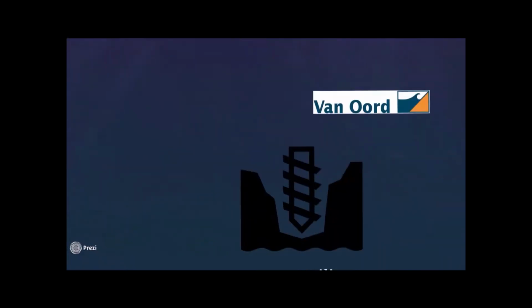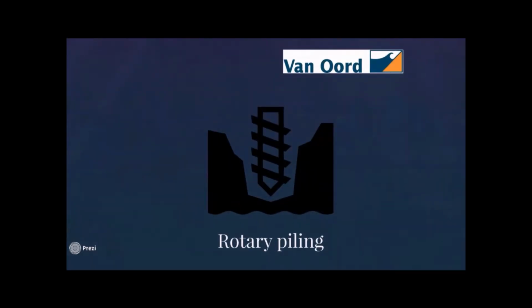Furthermore, the monopiles for these turbines will be installed using a new technique. This technique entails not driving the piles in by force, but drilling a hole and inserting them. With this technique, the allowed pile driving period that is maintained on the North Sea does not have to be taken into account. Should this technique prove successful in phase 1, it could be used for all the foundation piles in phase 2, greatly increasing the flexibility of this phase.